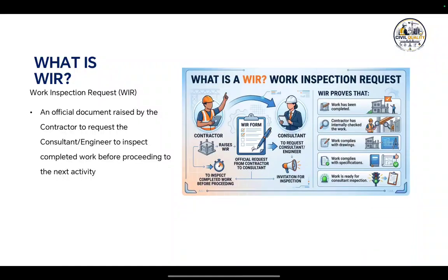By submitting a WIR, the contractor is confirming that the work has been completed and internal quality checks have already been carried out. The work complies with the approved shop drawings and the project specification, and it is ready for consultant inspection.